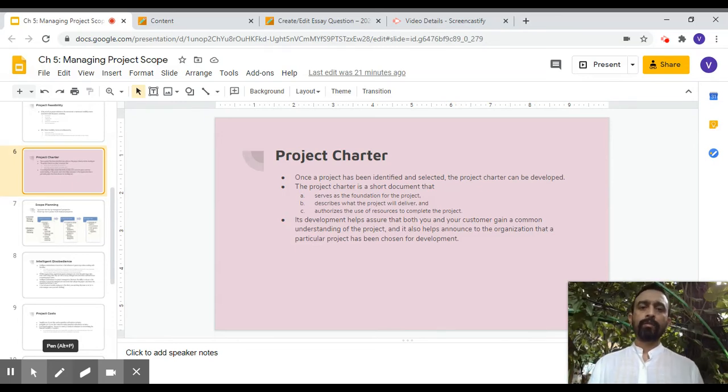Okay, or instead of saying, oh, it's going to be easier to find information, say, okay, so right now we have all these 20 employees saving things in different Google Sheets on a shared Google Drive. So now we have 200 different Google Sheets, and it becomes difficult to find out which information is stored in which Google Sheet. So what we want to do is get a software that'll give us a login and tell us exactly what's where, so that we won't have to keep going from sheet to sheet trying to find the information. Okay, now that is an example of a requirement.